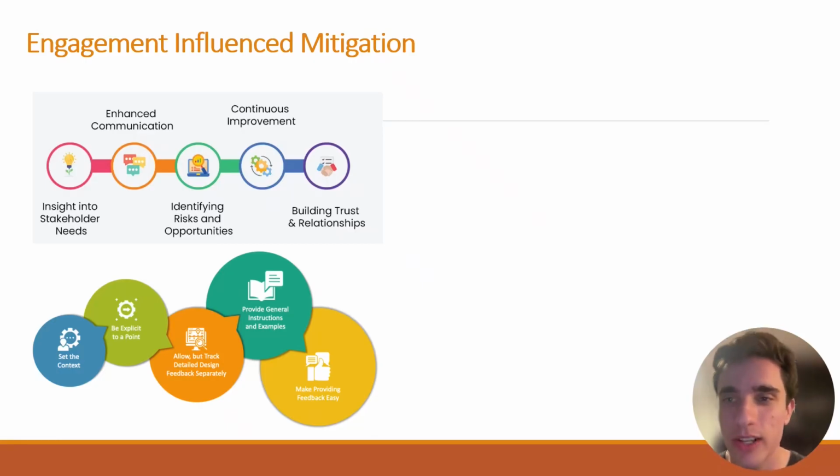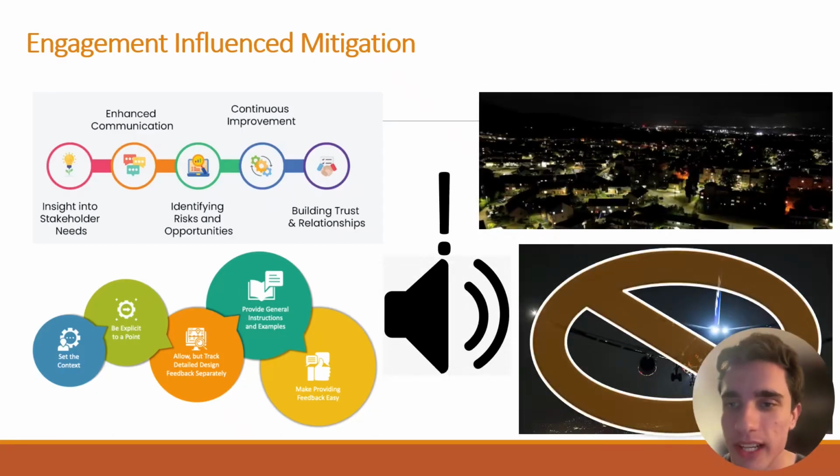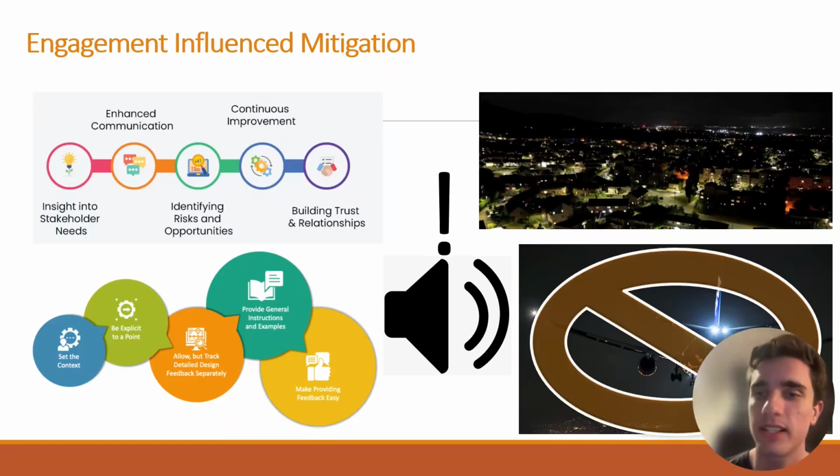As a result, the final EIS included changes intended to minimise aircraft noise, particularly overnight. This does not mean all stakeholders were satisfied and does not mean the noise impact disappeared, but it does show that consultation had some practical effect. For example, the government committed to measures such as prioritising reciprocal runway operation at night where safe to direct aircraft away from more heavily populated areas and reduce nighttime impacts.